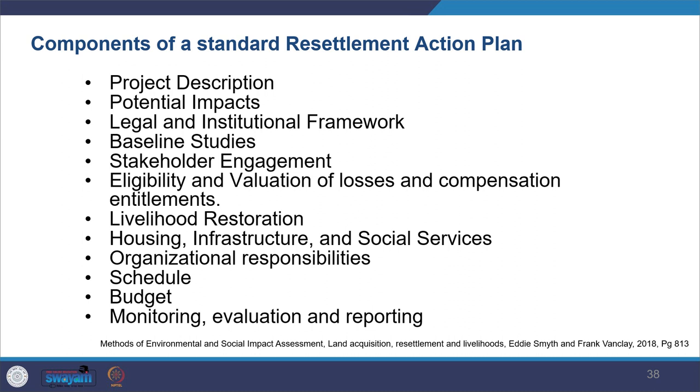then how you have engaged with the stakeholders, a summary of the public consultation, and what kind of disclosures were done for the resettlement planning, and how you engaged with local households, local authorities, NGOs, and the host community. And what kind of system you have in place for addressing grievances, what your eligibility criteria will be, how you're going to put a value to the losses, and how you're going to work out the compensation. And then what is the methodology you're adopting for assessing or giving a value to the losses which will happen. So mostly you'll have, as per the local law, what has to be done.